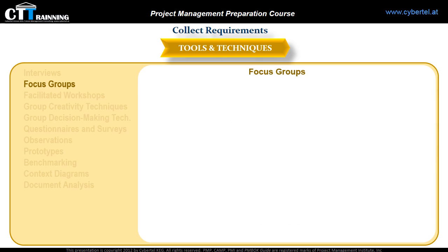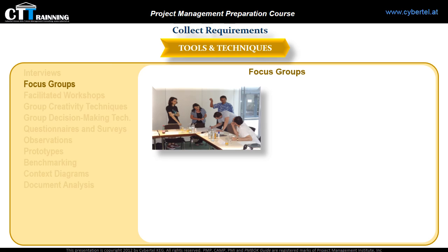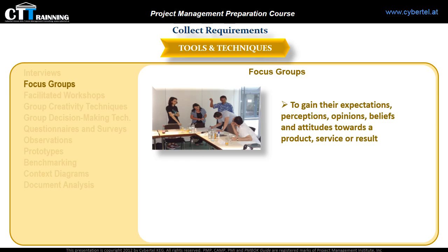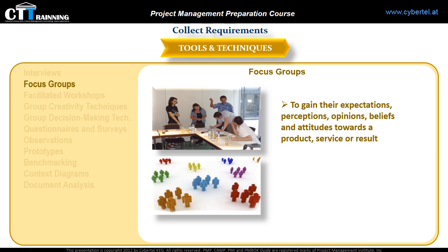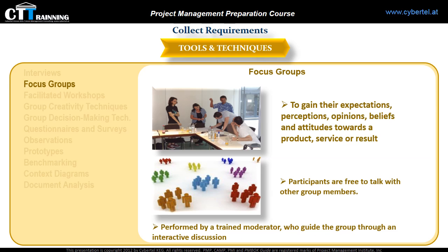The second technique is focus groups. Those are groups that contain subject matter experts and qualified stakeholders to gain their expectations, perceptions, opinions, beliefs and attitudes towards a product, service or result. In one word, project deliverables. Questions are asked in an interactive group setting, where participants are free to talk with other group members. This task may be performed by a trained moderator, who guides the group through an interactive discussion.